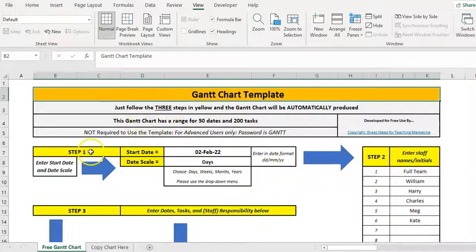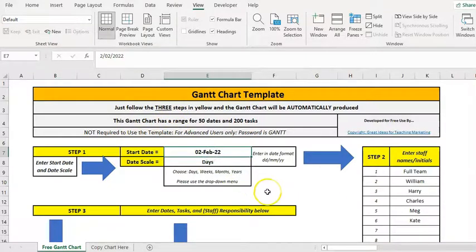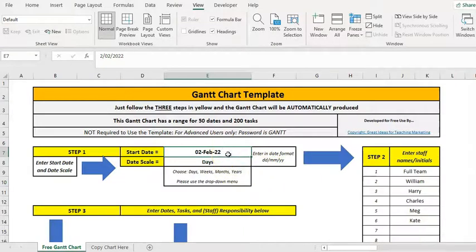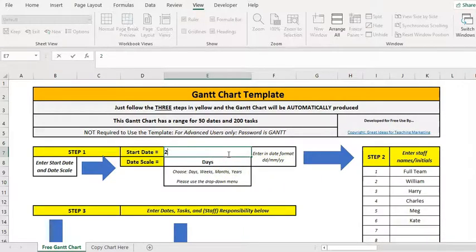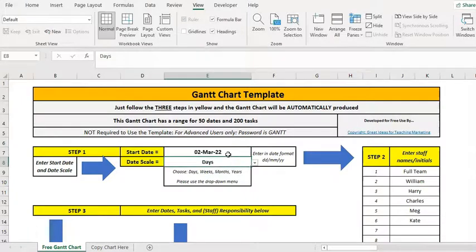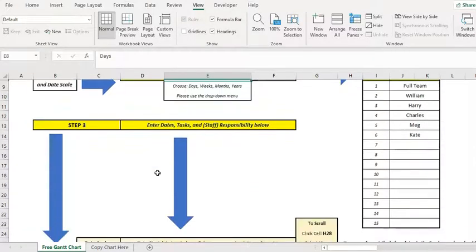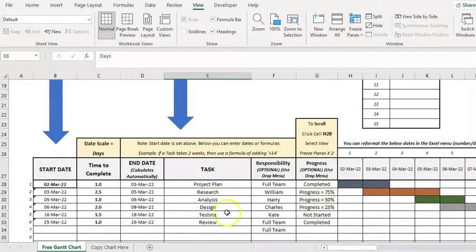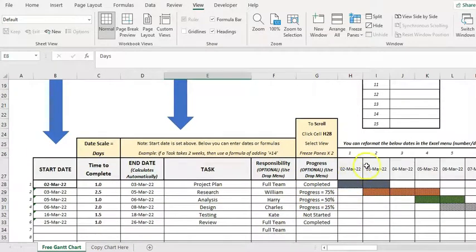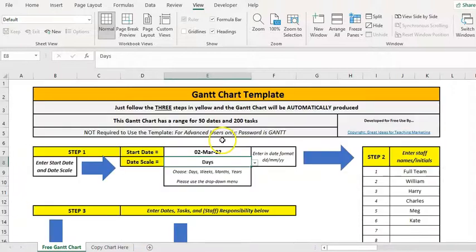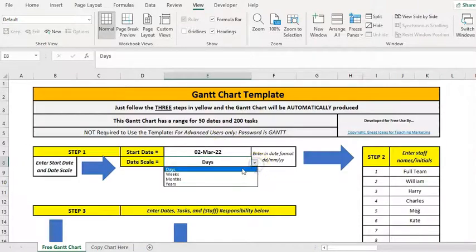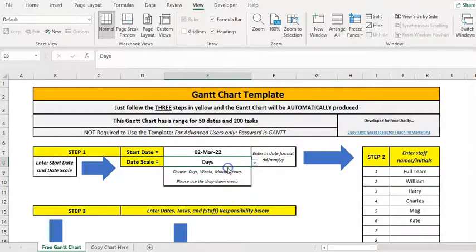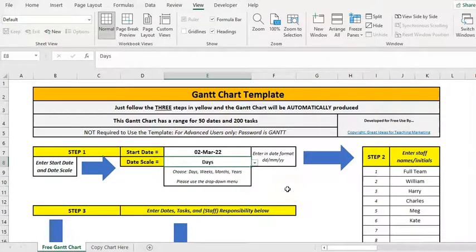So the first thing we do is set the first date of the project and you just type that in into date format. Then on the date scale, this is our Gantt Chart down here, is this going to go up days, weeks, months, etc. And that's a drop-down menu so you just pick the scale of the dates you're going to include.